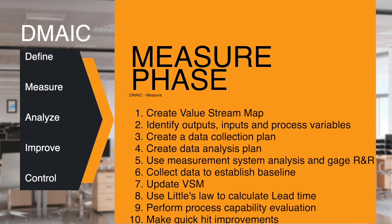To successfully perform the Measure phase of the project, you should follow these steps. First, create a value stream map to confirm the current process flow. Second, identify outputs, inputs, and process variables. Third, create a data collection plan, including operational definitions for all measurements.